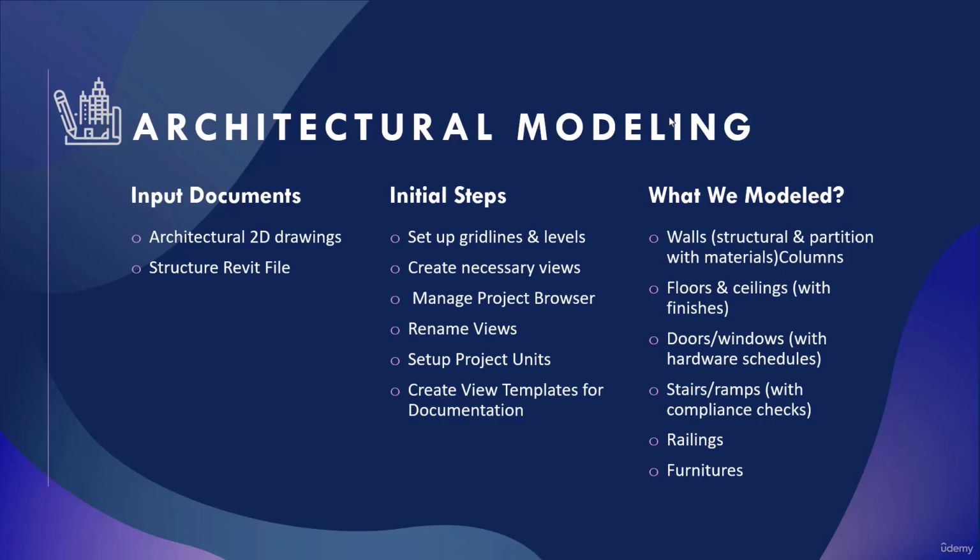When the guys finish their models, they go to the drawing. Why? Because the views are already inside the sheets, and the scales are correct. They just have to put their things in order and do the final touches. But they're just drawing and viewing, and that's it. See, these are the things that you have to do simultaneously. It's not like you first complete your model, then you say, well, let's go name them, make the template for the views, make the sheets. No, these must be done evenly.